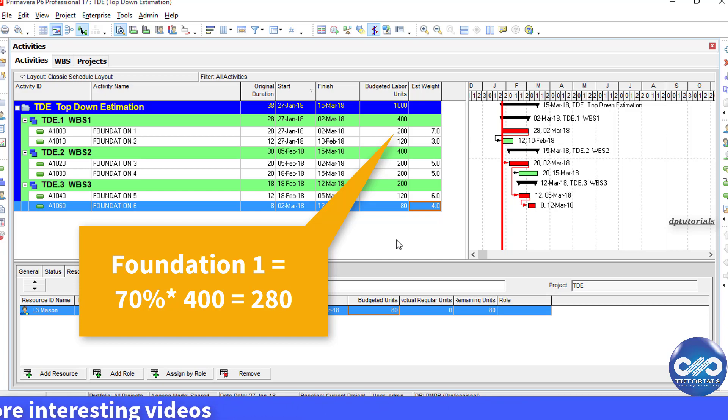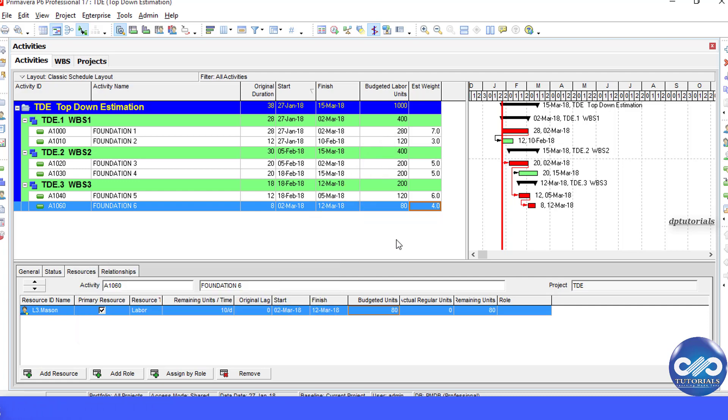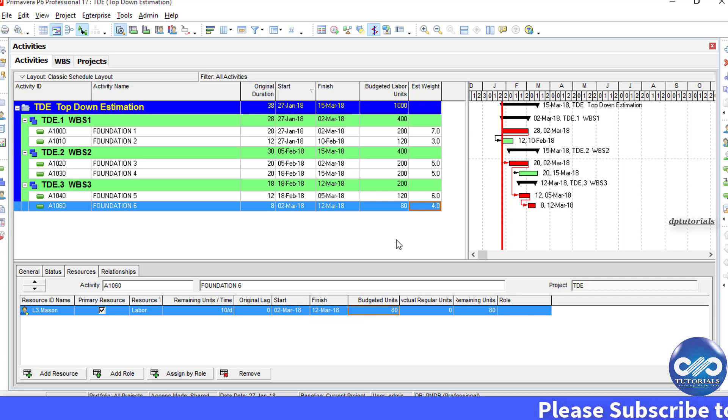So, similarly, these budgeted units have been distributed to all the activities. So, friends, this is how it is done. With this function, we can quickly redistribute units to activities.